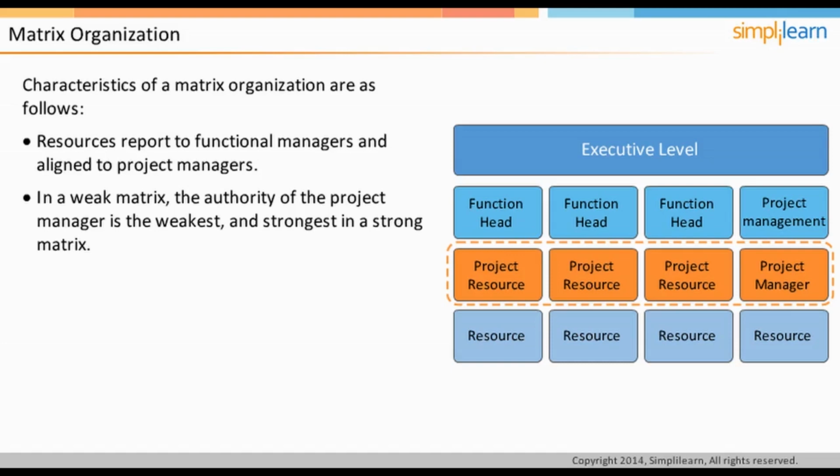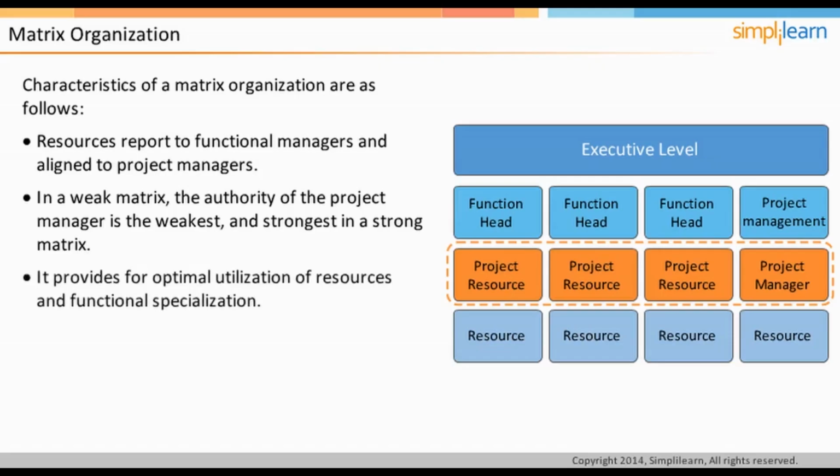The titles given to project managers in functional or weak matrix organizations are Project Expediter or Project Coordinator. They would be called project managers in a balanced or strong matrix structure and have slightly more authority over the time of the team members. The advantage of the matrix structure is that resources can be optimally utilized while preserving the capacity of the project managers to get projects executed efficiently.